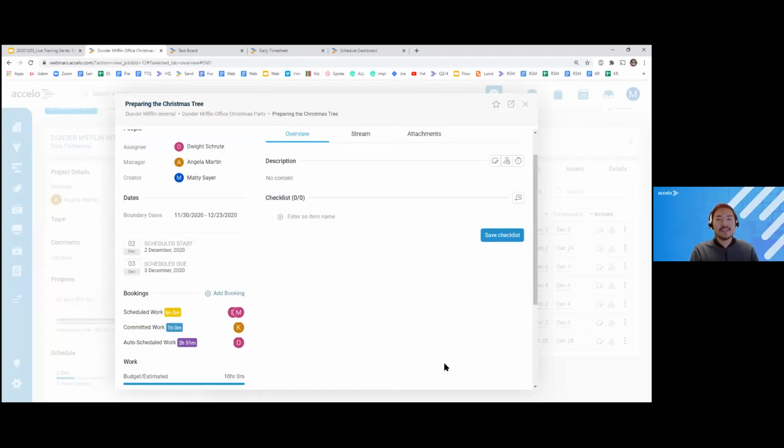Now, alternatively, let's say that you know that you're going to work on this 5-hour task for another hour, let's say on Friday, but when exactly on Friday is not yet defined. So that you can have this time block appear within your Accelo schedule, you go ahead and commit the time instead. Now, committing the time does not push to your integrated calendar as there is no specified defined time. So that's the alternative that we're seeing here.